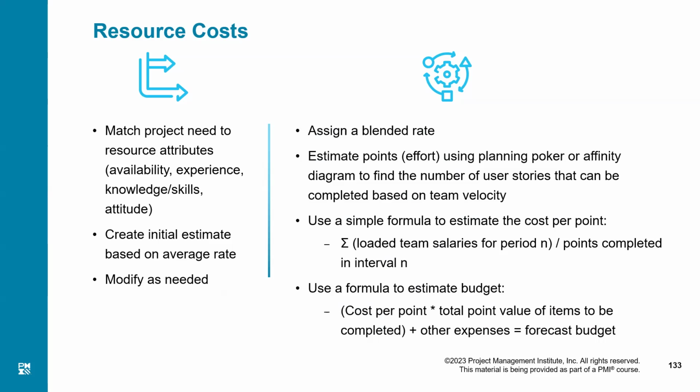And what about the whole project? If I can apply this formula to the whole product backlog, I can come up with an approximate figure of the amount required to complete the whole agile project. So without going into the difficult calculations of each and every activity and each activity's time, we have invented a new formula, right? Cost per point.